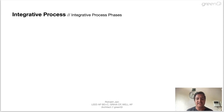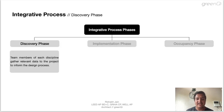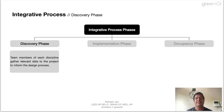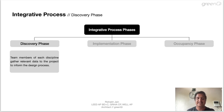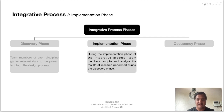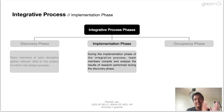Now let's move on to integrative process phases. The integrative design process requires active and continuous participation of all team members during all phases of the project. The project is divided into three phases. The first is the discovery phase, also called the pre-design phase, which occurs before starting schematic design. This is the most crucial phase of the entire building design process. Team members of each discipline gather relevant data to inform the design process. For example, water calculations can be done before the design begins, as it may help optimize potable water consumption by informing the design team of the size of water treatment plant required beforehand. Similar analysis can be done for waste management or energy management. The second is the implementation phase. During the implementation phase, team members compile and analyze the results of research performed during the discovery phase, and the design of the building begins to develop through sharing of the collected data.